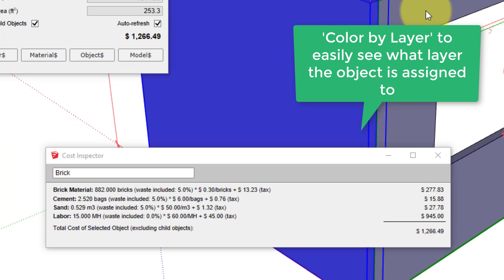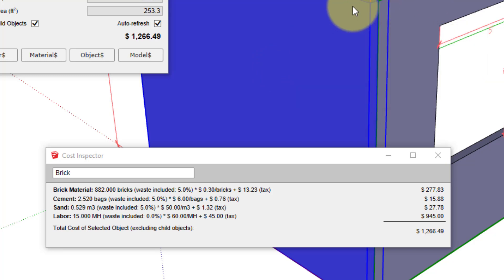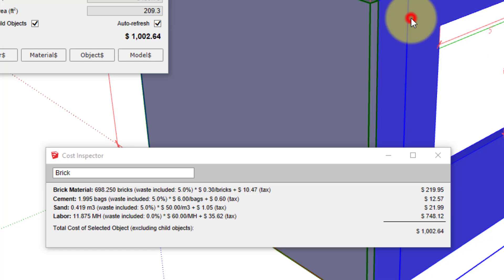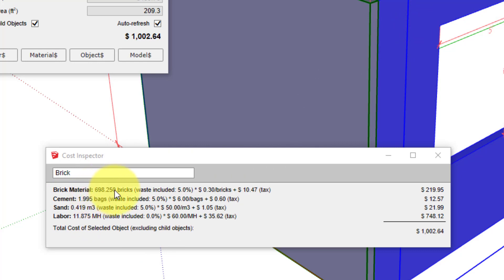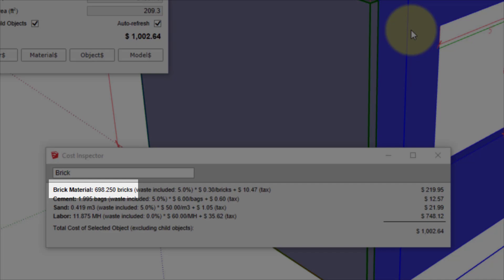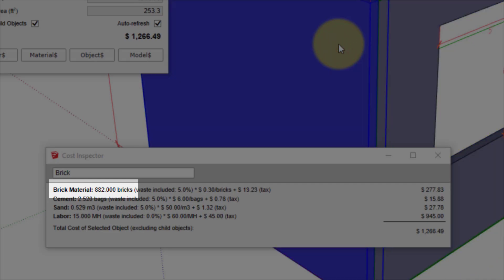The Cost Inspector shows objects with cost data highlighted in green. If the object does not have cost data, it will show a red bounding box. When you click the object, you can see it instantly updates to show the complete cost calculation line by line. For this portion of wall, 698 bricks are required, and for this one, 882 bricks are required.